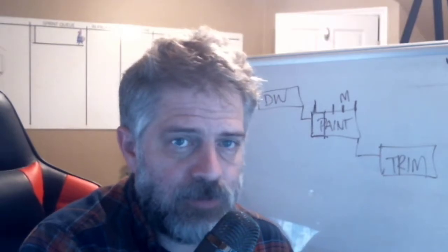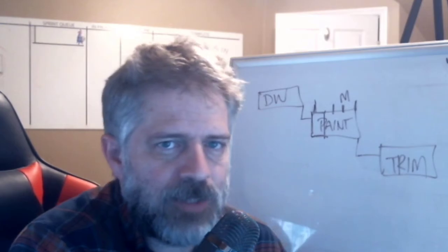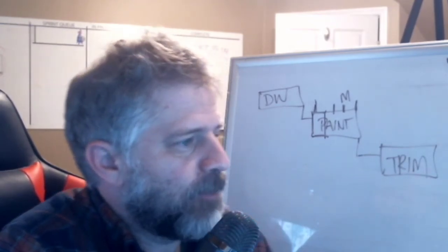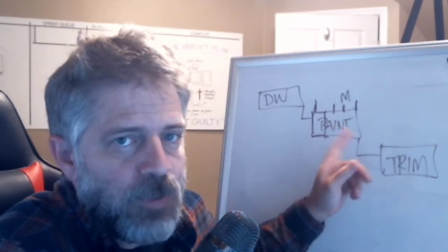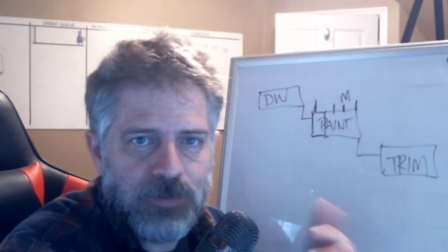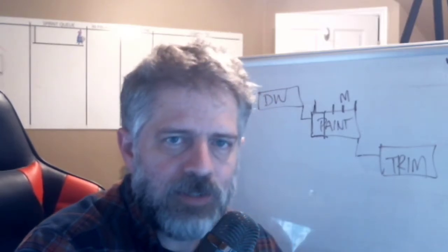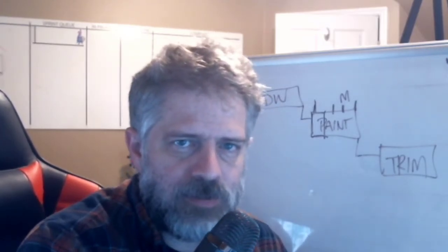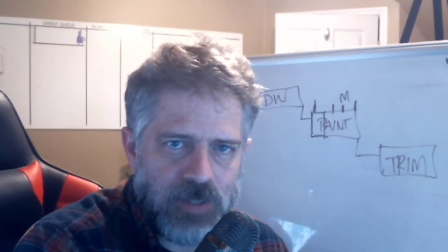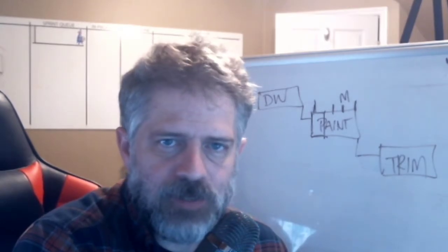So now I'm just having to tell the trim carpenter, hey, I think we'll be done. What's your schedule? I start to feel him out, and it may be an extra day or two, and he's starting to get frustrated because he's already scheduled his week around me. And so often what happens, because the margin's been consumed, is a subcontractor's living in this marginless situation where they're always running behind, always paying it forward to the next job, finishing the job before by consuming margin that was scheduled for the next job they're supposed to go to. It's so easy just to live in that scenario.